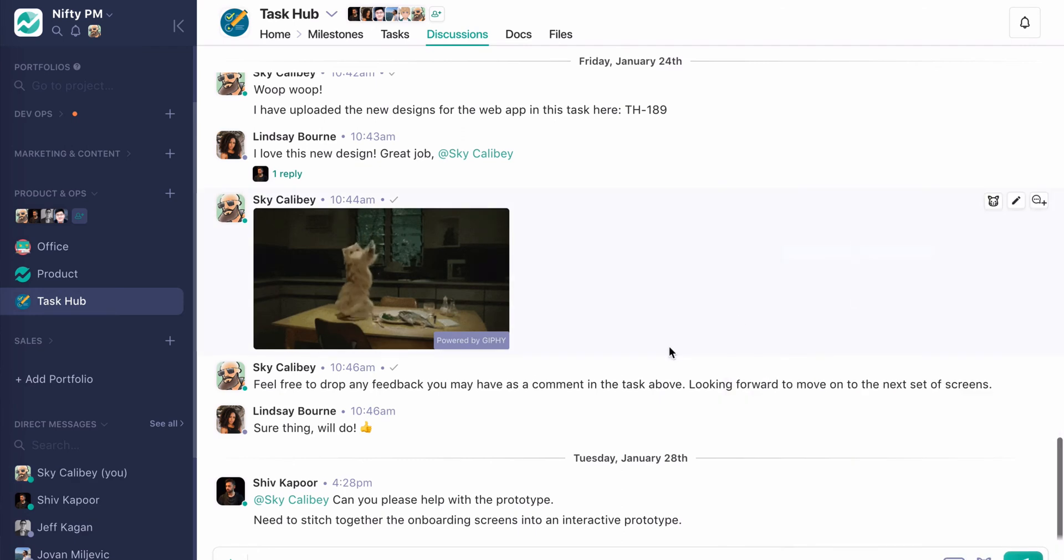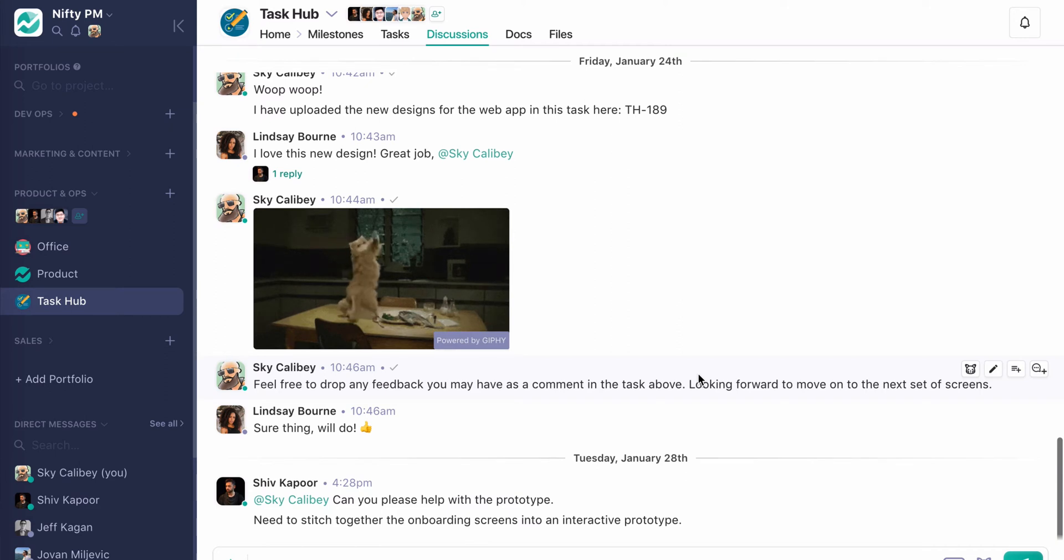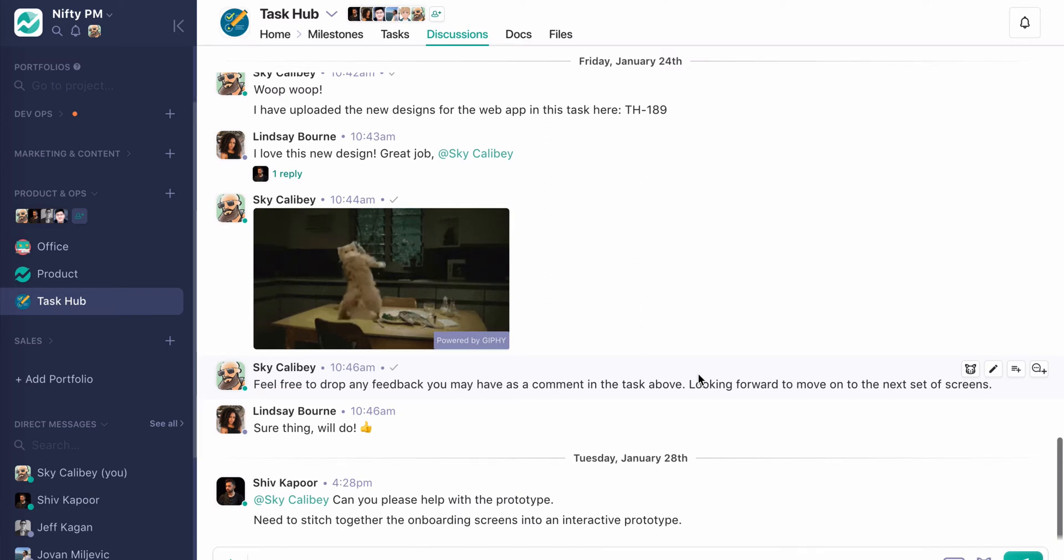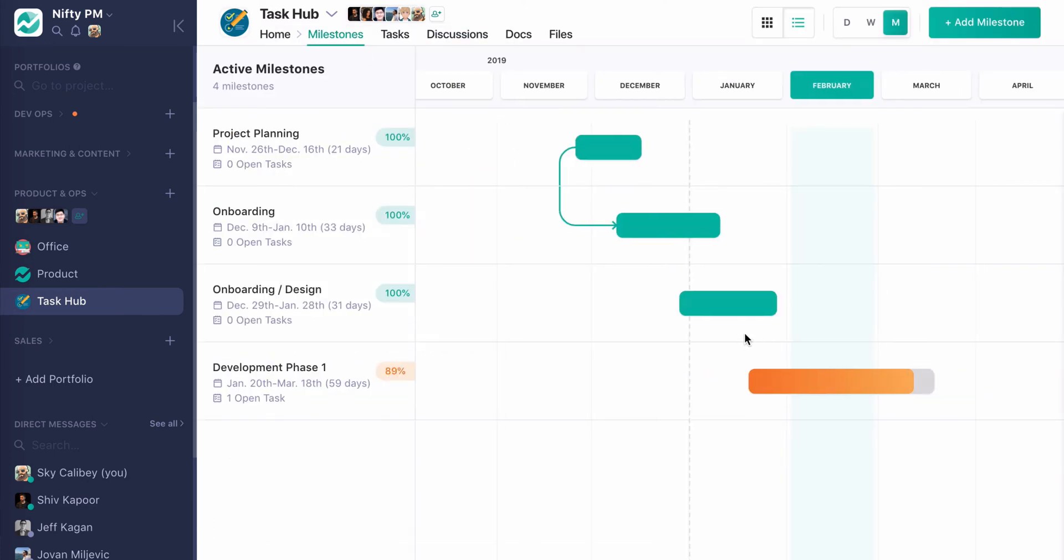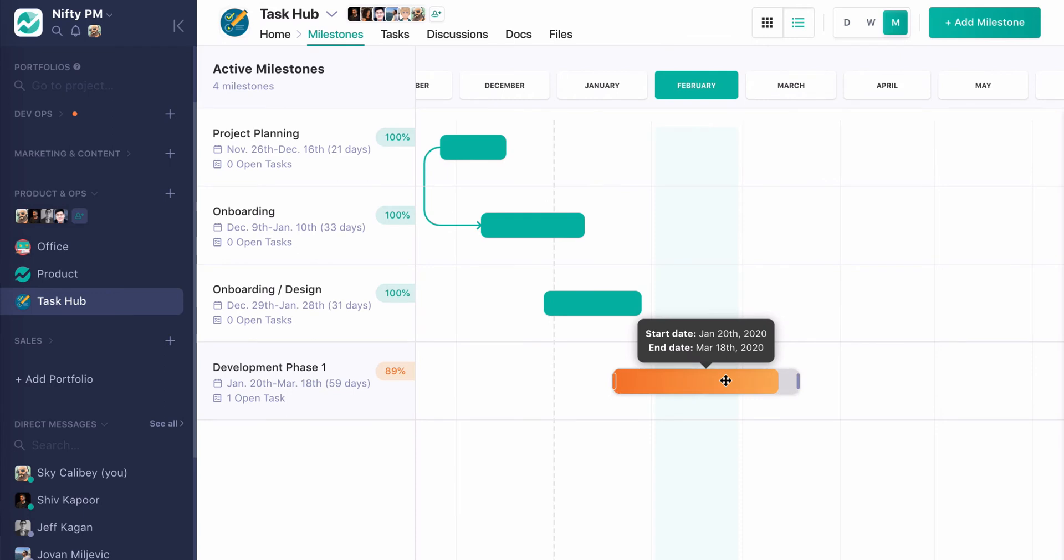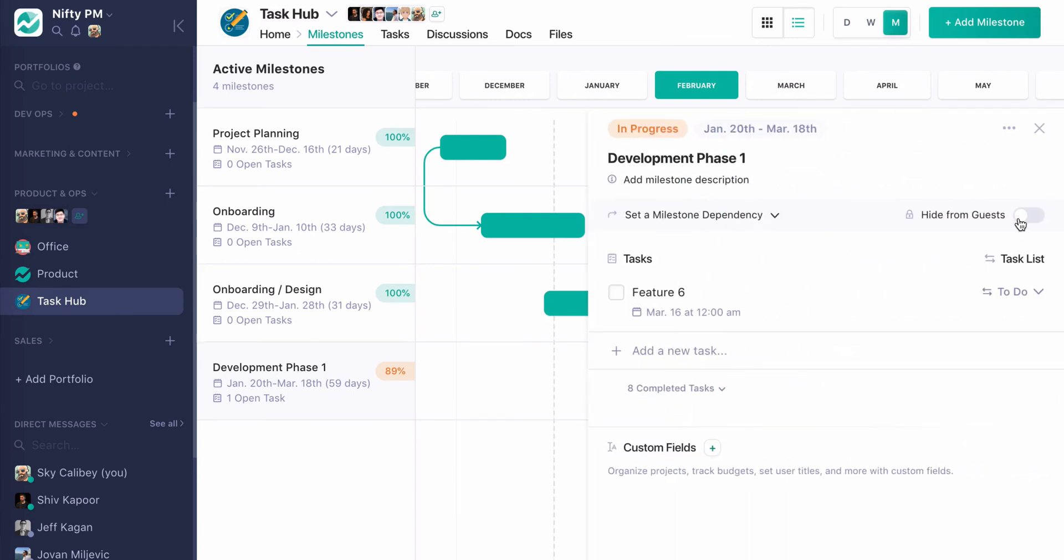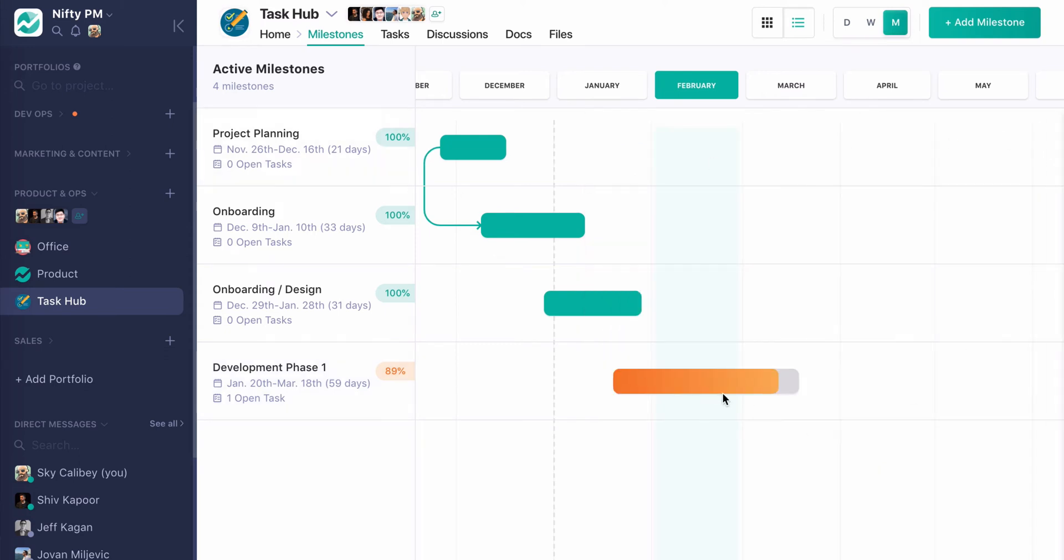So those are some of the barriers you'll be looking at when you're bringing guests in. But that said, guests have a lot of power in Nifty. They're able to go through and assign and complete tasks. And that way they have a good sense of that workload and they can get their hands dirty in the workflow as well, especially important as we covered on completion. Which actually brings me to one of my points here. You are able to hide milestones and tasks from guests. And any tasks assigned to a milestone that is hidden will also be hidden. And so that's a good way to work with your internal deadlines as you report. And then kind of have more of delivery oriented tasks once you've maybe gotten some of the nitty gritty of creation out of the way internally with your team. But it allows you to keep that all in one project rather than have to duplicate it and run it in two separate places.